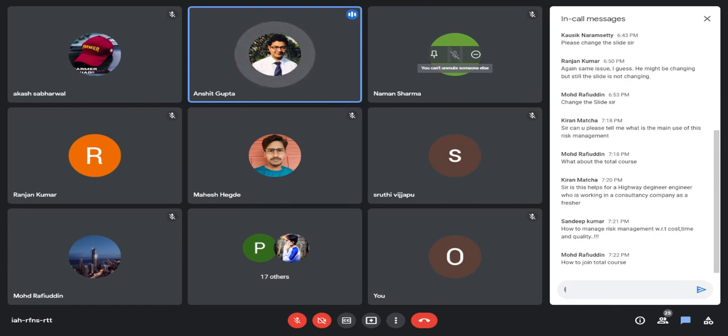So whenever you enter all these things in the risk register, your management will come to know that your project is delaying by so many days, XYZ days, because the labor at site is less. So if you are not able to take corrective action, your seniors will take corrective action. At least someone will take corrective action, and maybe you will change the contractor, and you will go step by step. So this is what the risk register helps you with.